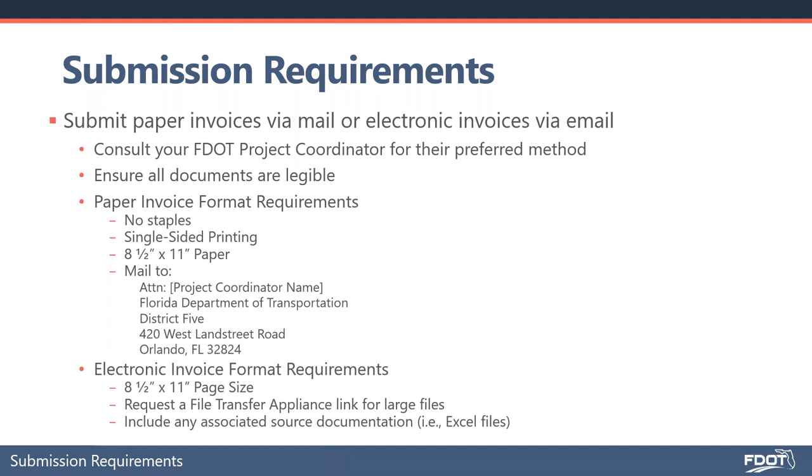Make sure, like I said before, that all the documents are legible. We've gotten a lot of kickback from financial services about this in terms of auditing. There's no way that we can audit something that we can't read. So just review the quality of your scans if you're submitting them electronically. Review the size of the fonts that you're using when pulling reports. All of that definitely helps. When you're submitting, as has been standard, no staples, single-sided printing only, and 8.5 by 11 paper.